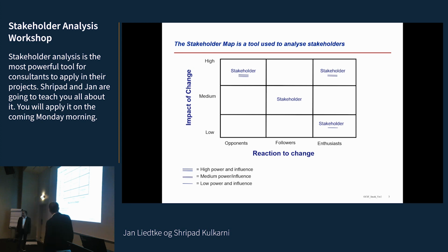In these 6 quadrants, you're going to place your stakeholders. On the x-axis, we have the levels of support: you have project team members or stakeholders that are opposing the change. These are difficult people. They can be questioning a lot of things, wondering if you're doing the right thing. They are even destructive. They don't like what you're doing. They're blocking you. You don't get forward.